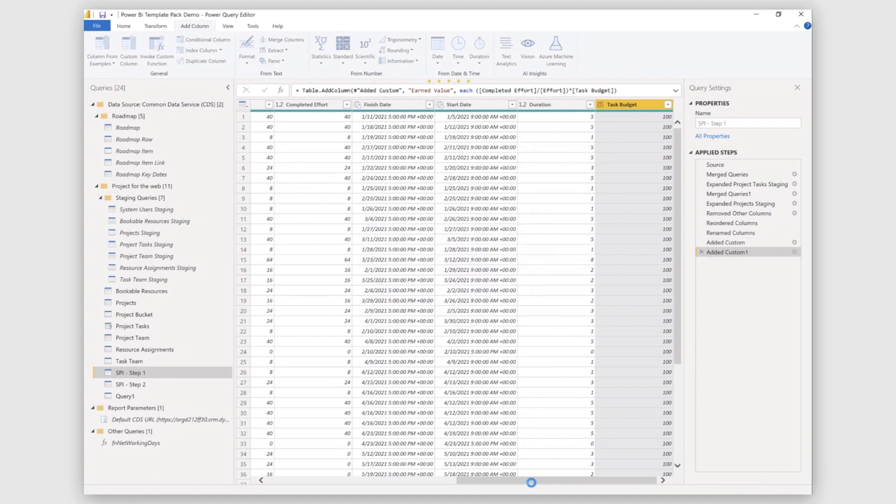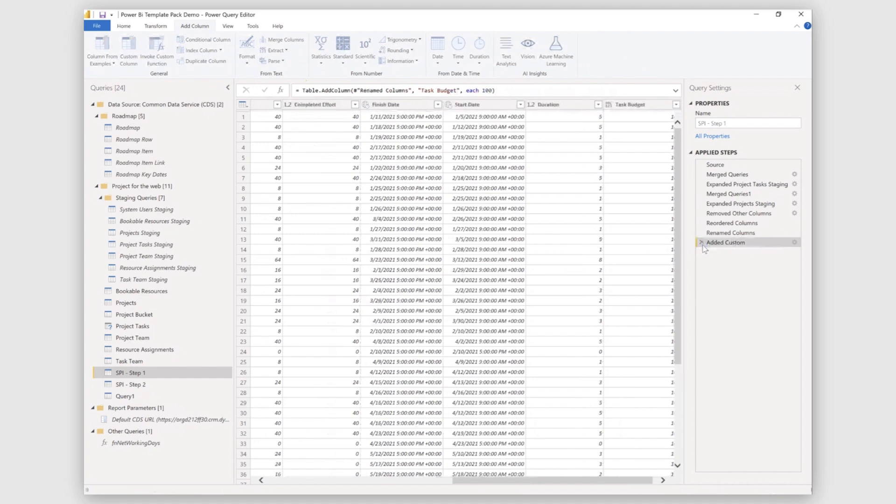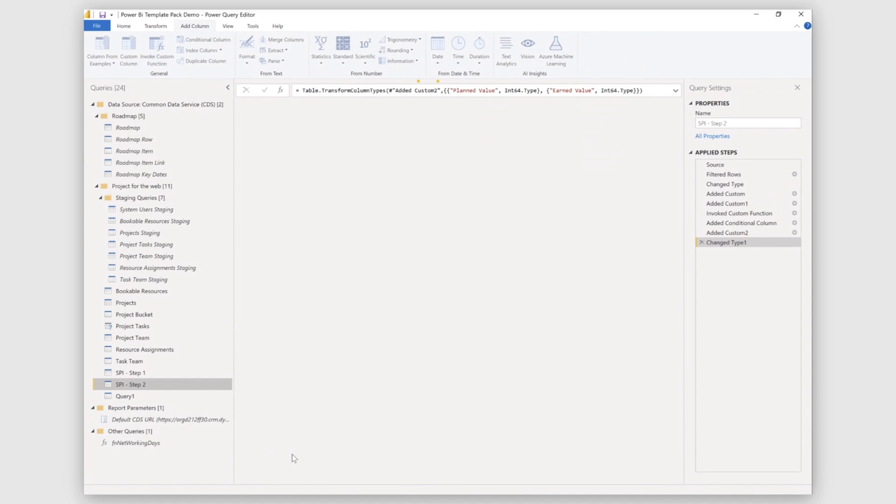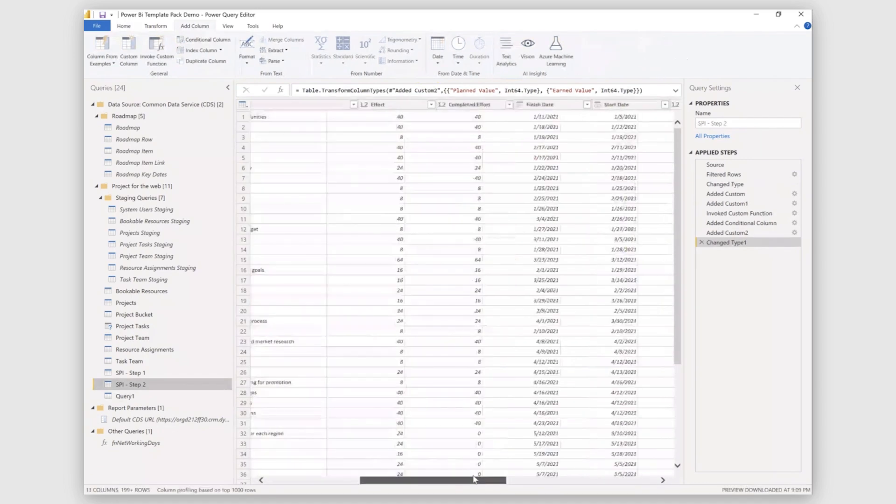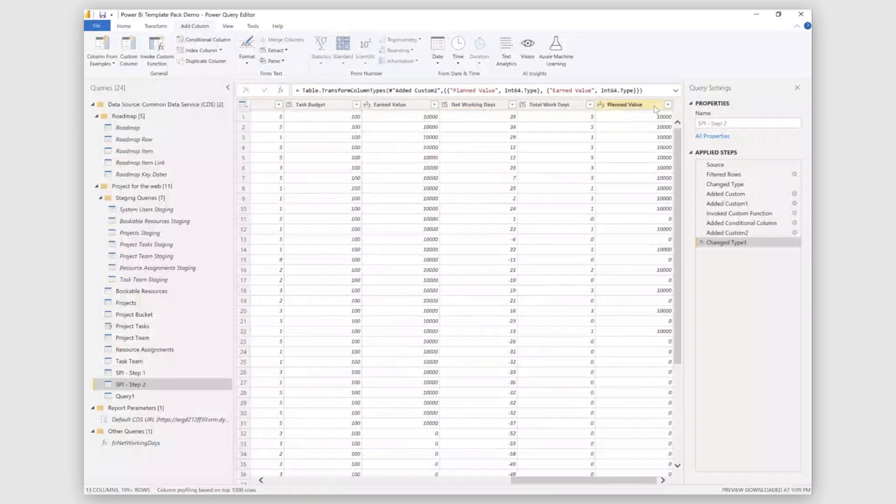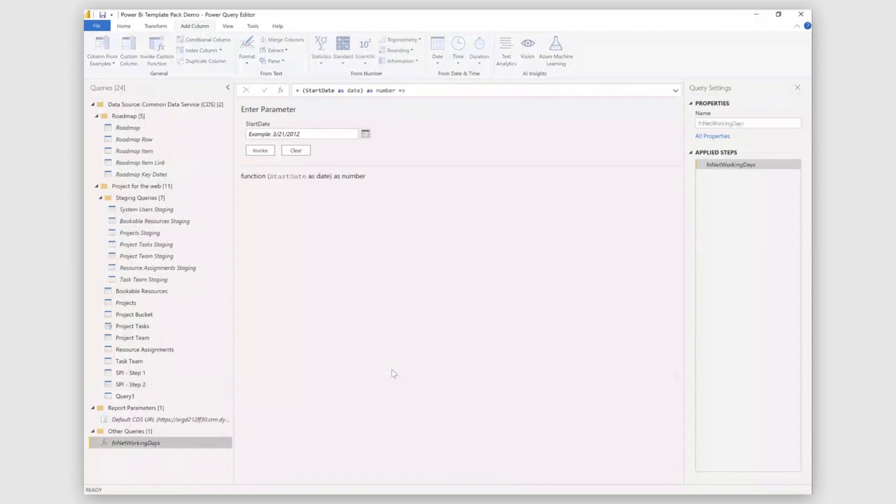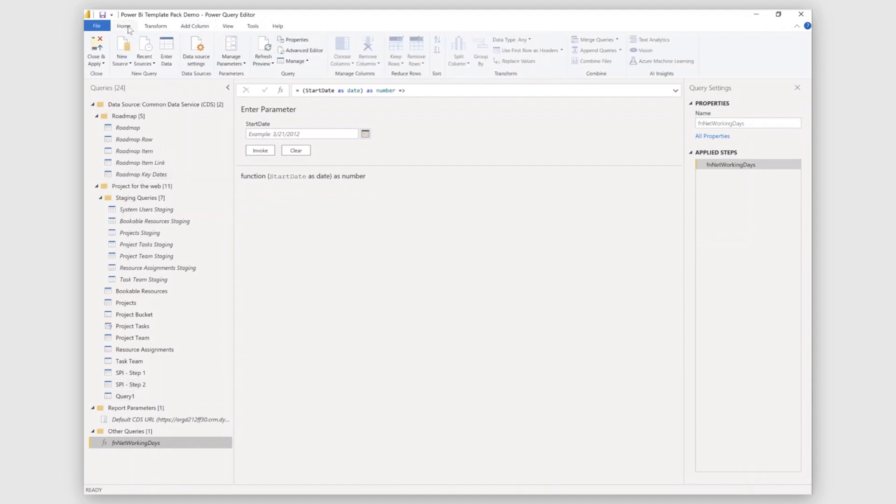So this is how we calculate earned value. Similarly, you can calculate planned value. And I have these values calculated in my SPI step two. So I'll be removing these columns from here. So you can see here that I have calculated all the values, the planned values and earned values. So for planned values, I needed networking days between today's date and the starting date. For that, I have written a function which returns the value of number of days that have passed from your starting date to your current date, removing all the weekends in between. So I'll go and I'll close and apply here. I won't be doing that since I already have these values in my tables.